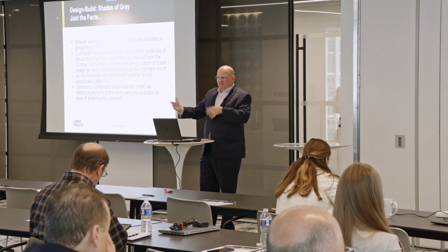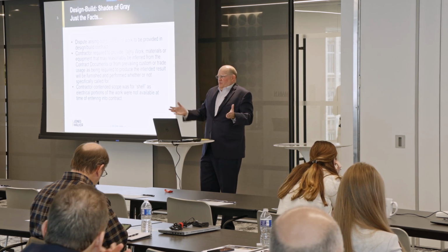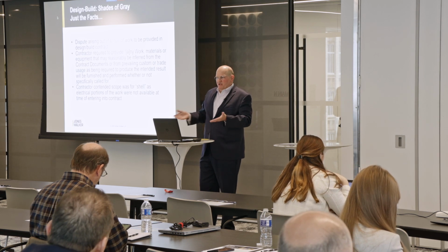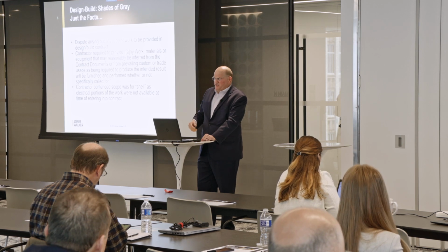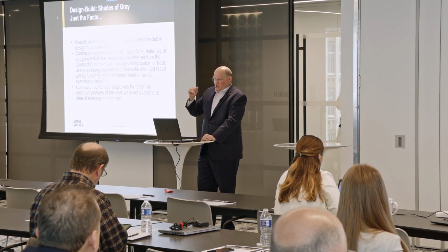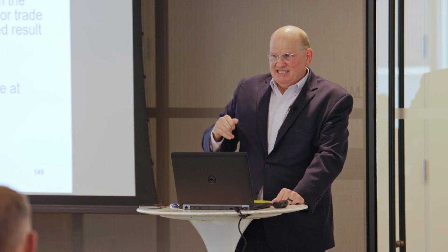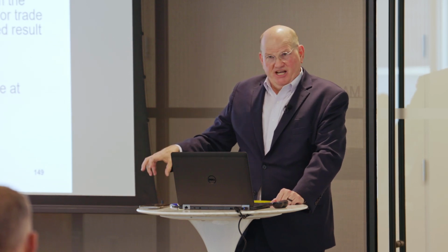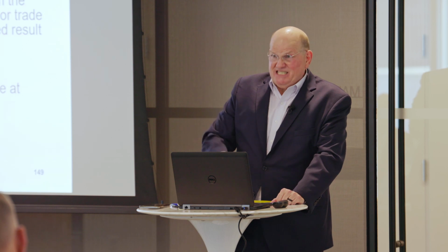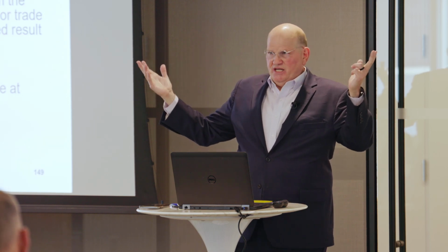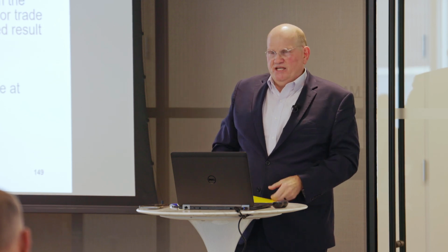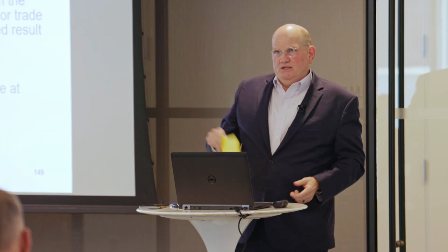Like one is there's a bunch of fans and pumps and things that was in the partial design that was part of the scope, and they're like, well, we thought we could take that out, or we thought we could run this different conduit. And when they get to the facts, and contractually they are design specs or specific requirements of the owner, just saying, well, I'm the design builder, I can do anything I want, that does not work either.